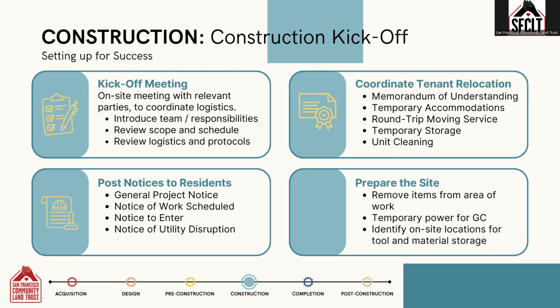The construction manager will provide keys if available and access information. They'll review the tenant notification requirements, review the change order process, confirm working hours and site protection requirements. They'll reiterate professionalism, smoking and music policies. They'll identify on-site storage location for tools, materials, permit drawings, and job cards. They'll confirm lavatory facilities and parking locations.